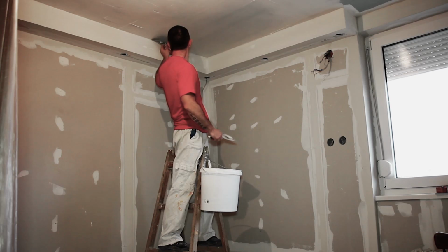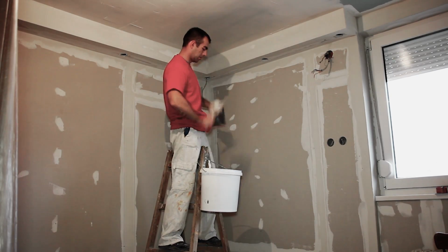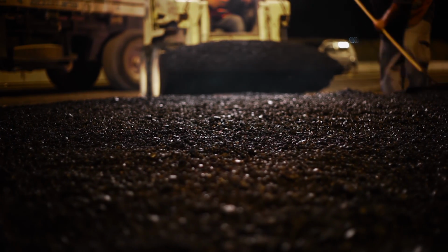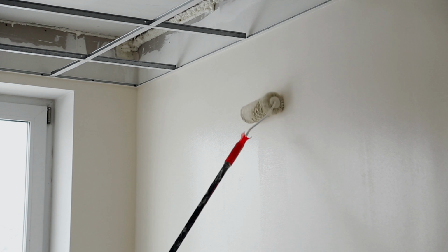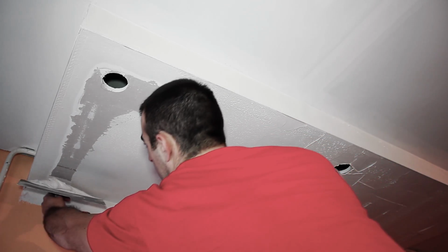Bidding process for us, we wanted to be able to open that up and make opportunities for all the local contractors. And so you looked at and bid it out as like a per job basis. So if you look at painting or drywall or flooring, brick and masonry or asphalt, whatever it is, all those things were put out singularly. So you're going to have several painters in a county the size of Madison County, so they've all got an opportunity to bid on it if they like. Same thing with the drywall or the asphalt.